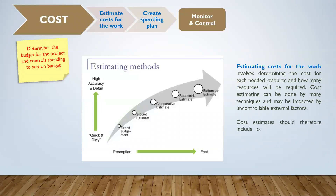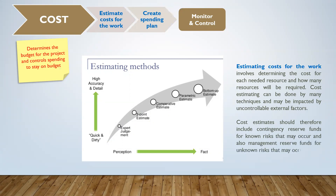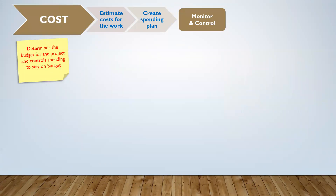Cost estimates should therefore include contingency reserve funds for known risks that may occur, and also management reserve funds for unknown risks that may occur.